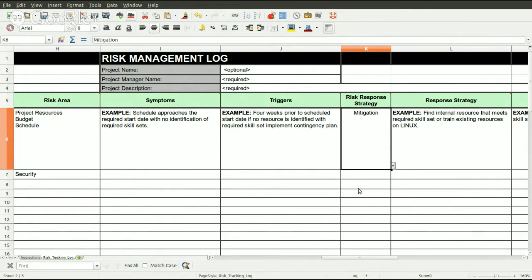And of course, here you have mitigation. So there's another risk response strategy. How are you going to mitigate it? Maybe mitigating is adding more people to the actual task, which happens a lot, especially in software design tasks. If you're behind schedule, they say, okay, you're behind schedule 2-3 months. We're going to add 20 people to the task to do the work. That's how we're going to mitigate it. We're going to add more people or throw more money at it. And it depends on maybe the past experience or past similar programs done within the organization, if that's even a real risk response.